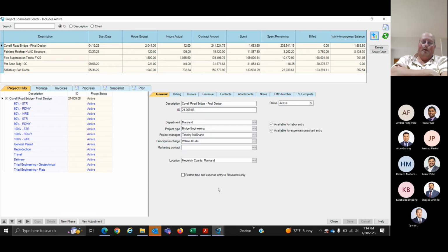The other thing with that scheduler, it's going to be critical to do that with the interns. Because if we're moving them between departments, having the information there that this person's needed is going to be critical for planning. That'll highlight, hey, wait a minute, I've got this person for like 2 days a week for the next 3 weeks. If you need them full time, then I've got to go talk to whoever that PM is and see, is that real? Is that pressing? Can we make a deal?